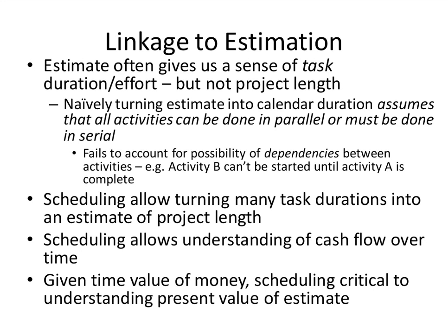Good. A worst and most likely, for example, and then we actually derive from that. So this is kind of the mode. We actually derive from that also a mean at one point. We could throw that in there. An expected value. Sort of the one that is sometimes different from the single most likely point. And this is maybe task name.